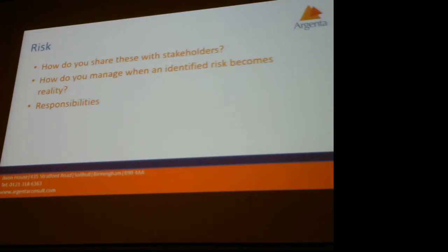I think that's a good point about quantifying the risk. If you can go to somebody and say, we've got this risk, it might not be a massive risk, you might say, this is going to cost 300 quid to sort out, or we carry on like this. They might say, well, 300 quid's all right, I'll accept that, and I'll go down that route rather than ignoring it. And I think that's quite a good point.